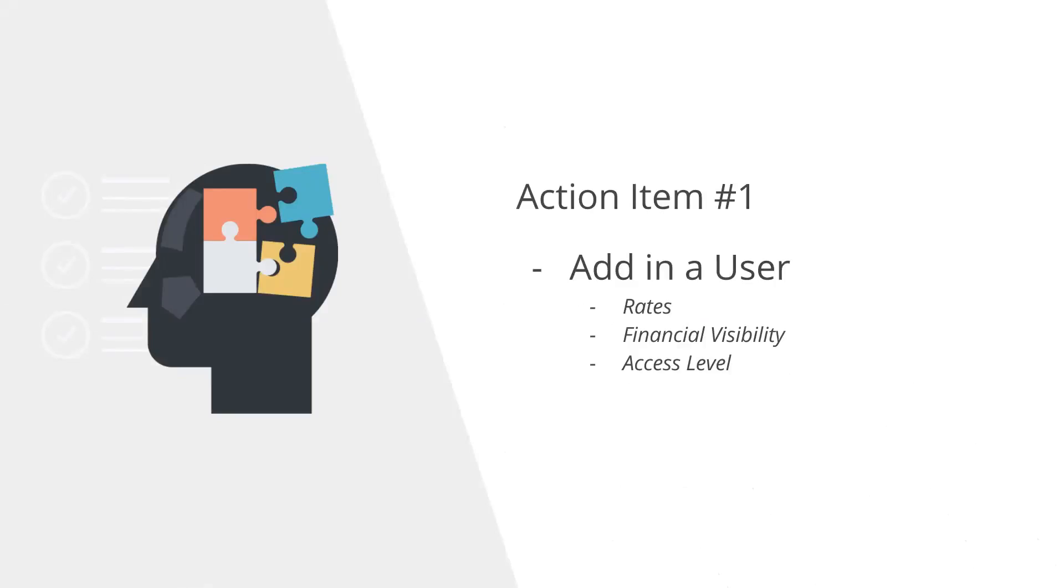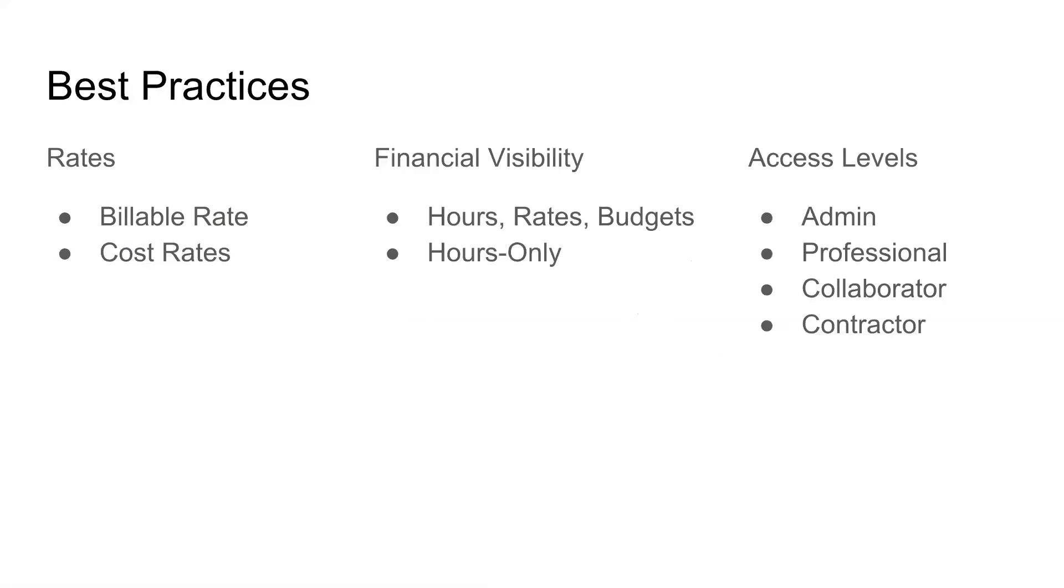Your first action item is to add in a user. Common scenarios are if you have a brand new user coming on board or you might be editing current users. There's three things to keep in mind. First one is rates. You have a billable rate and a cost rate per user. The billable rate is the billable value of work each time that user logs time. Your cost rate is an internal cost rate and potentially an admin overhead percentage, which is like 15 to 20 percent on average, that you'd like to have to track profitability for a given project. An example would be if you have an intern billing at $30 an hour, their cost rate would be $15 an hour to your internal team. Anytime they log time, you'll know you have a $15 profit margin.